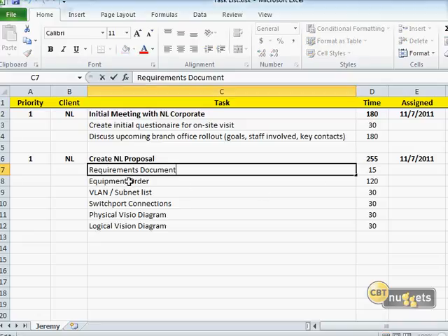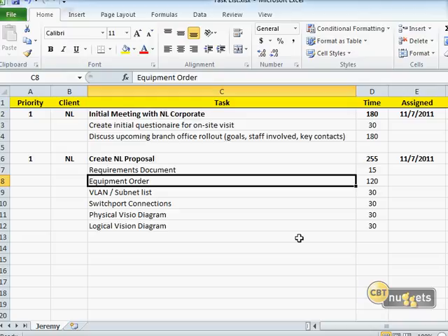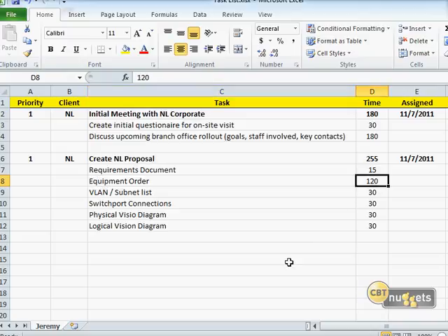Now we come to some of the big places. One is assembling an equipment order. It's funny because I looked at the time on my plan and thought, yeah right, Jeremy, wishful thinking. Let's double that, because it always takes more time to assemble the equipment than you think.